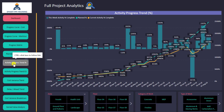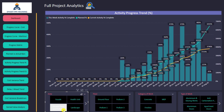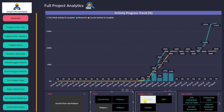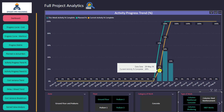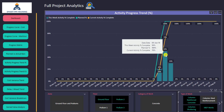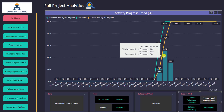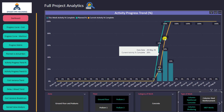I'll go now to the activity progress percentage trend, which can be very interesting. First I set up my filter — I'll choose the ground floor and podium area, maybe podium one concrete and column steel reinforcement. It will show me when the activity started and what the progress was each week. For example, an activity started, I achieved 20%, then 50% the week after, then finished the last 30% in the third week.